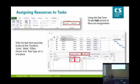So Tom, yeah. If you have a task one, for instance, 3 days, and you have one resource, and you're looking at the column over there, it's got the resource name. If you just plop somebody else's name in there as a second resource, does it automatically make it effort-driven at that time? No, it won't adjust any of these variables.